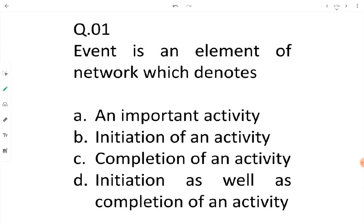Question: An event is an element of a network which denotes — options are: an important activity, initiation of an activity, completion of an activity, or initiation as well as completion of an activity. An event is an instant of time that denotes either the start or completion of an activity — that is, either initiation or completion of an activity.